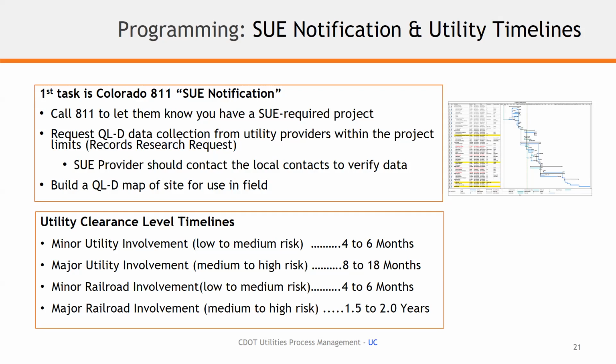But again, railroad involvement could be maintenance, on the low side, just a maintenance consent type thing, or a medium project where maybe it's widening a crossing or adding a sidewalk, and then a major project where you're building a new bridge for the railroad across your interstate, and it's required to build that bridge before you can do other phases.